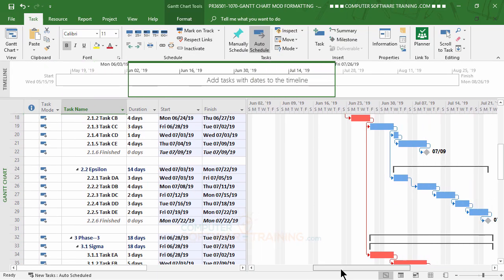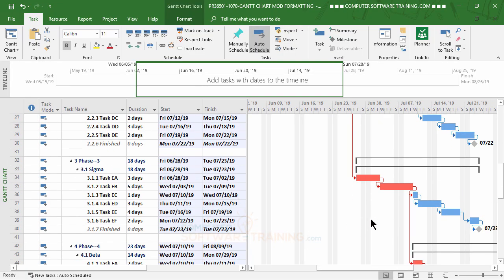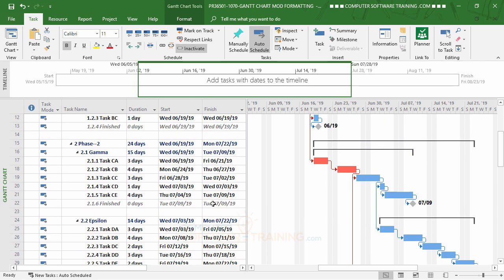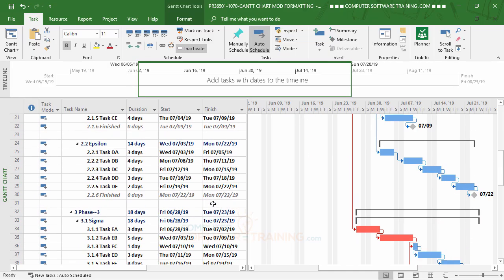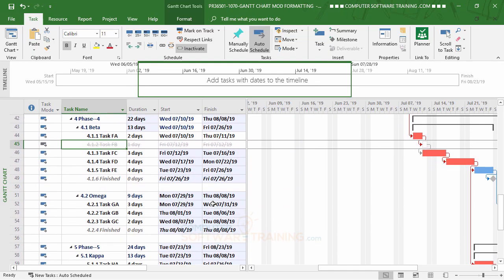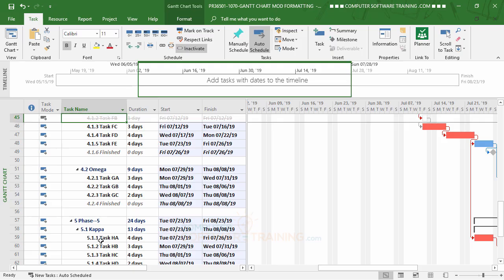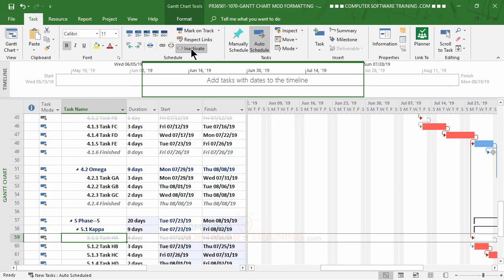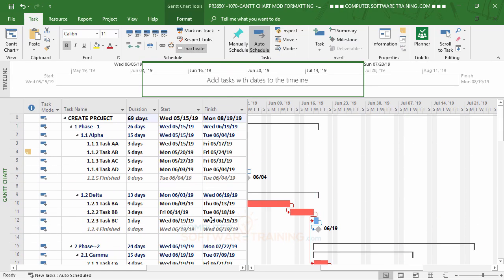What other ones do we have here? Let's go down to this one right here, and we say, okay, let's hide that one. Boom. Now that one brings it back to the 23rd. That's not enough, but if I pull that one and maybe this one here, so I'll go ahead and inactivate that one, and now that brings me back to what? The 19th, perfect. So maybe that would be the way to go. Those would be the ones you'd want to choose, and that's how you could fix it that way.